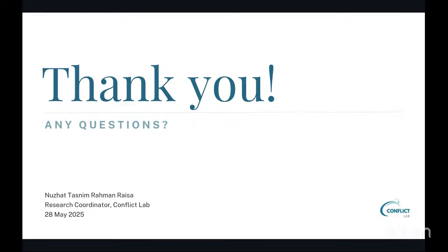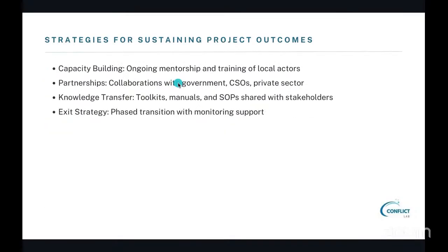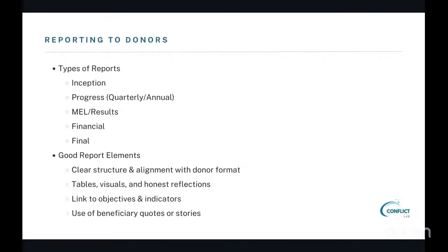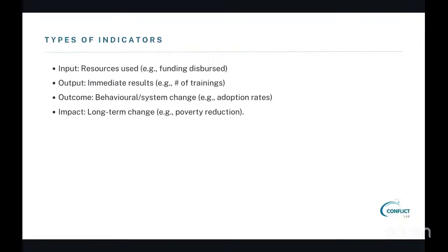I hope I was able to explain how this indicator table could look like, but basically it comes from activities. I think I could give you an idea about it a bit more. Right. So this is literally what it would sort of look like. It might have different names, but input is the activity that you're doing. Output is the immediate result. For example, yes, we're training 300 smallholder farmers. That's your output, the immediate output that you're training 300 people.